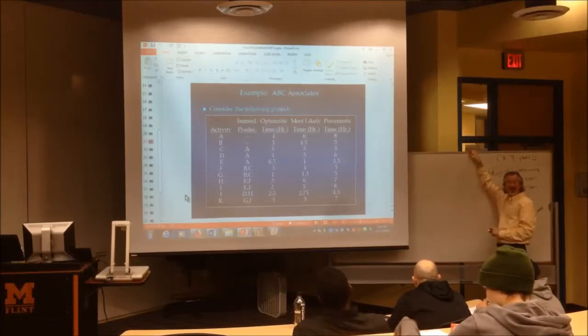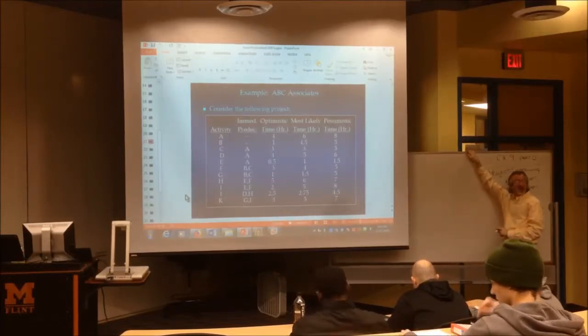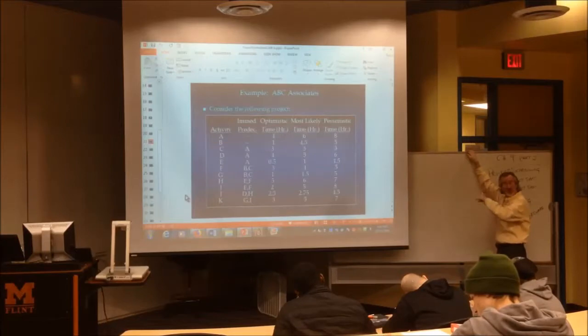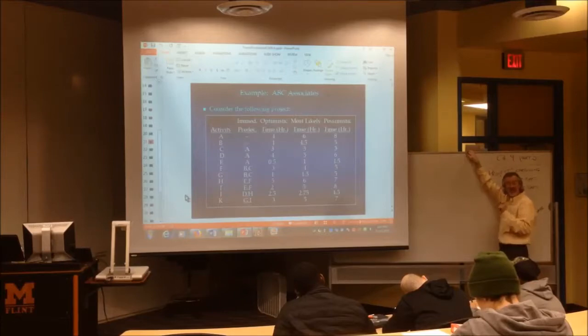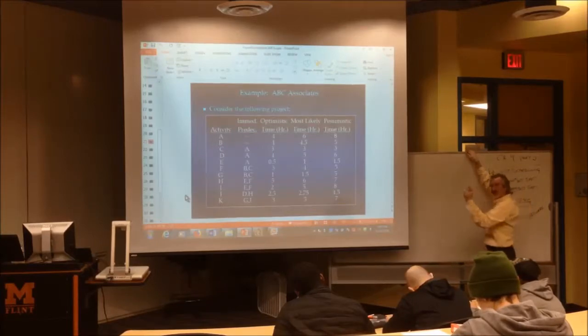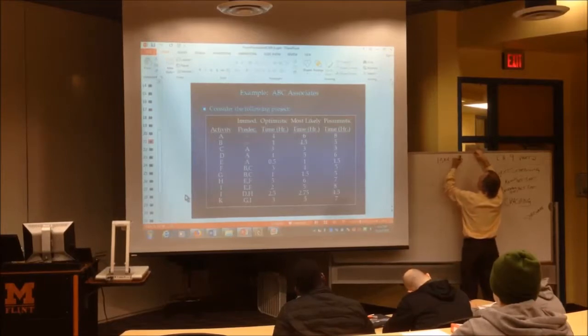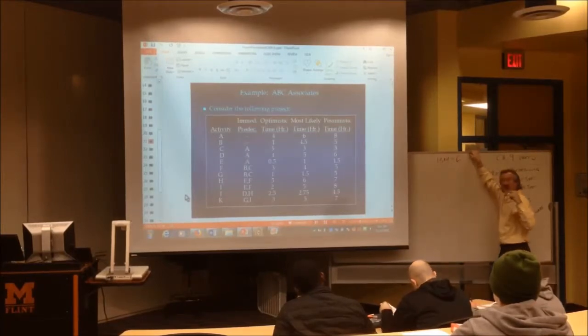These are those 2 formulas when you have uncertain times, when you've estimated the time. You have these steps before you start doing your forward and backwards pass to find the earliest starts and the earliest finishes and everything. What would you do to calculate the expected time for G? Let's start with the 1.5. Multiply it by 4. 1.5 times 4 equals 6. Then do what?